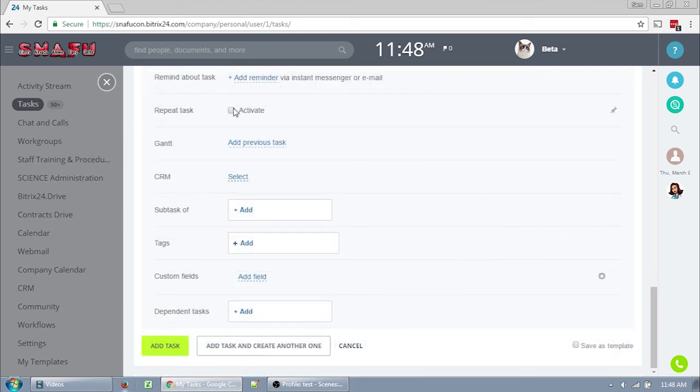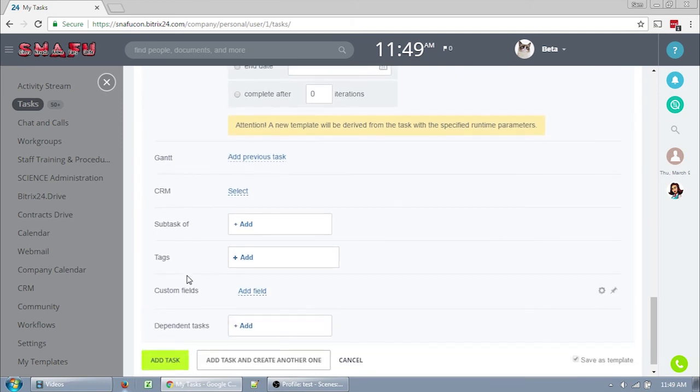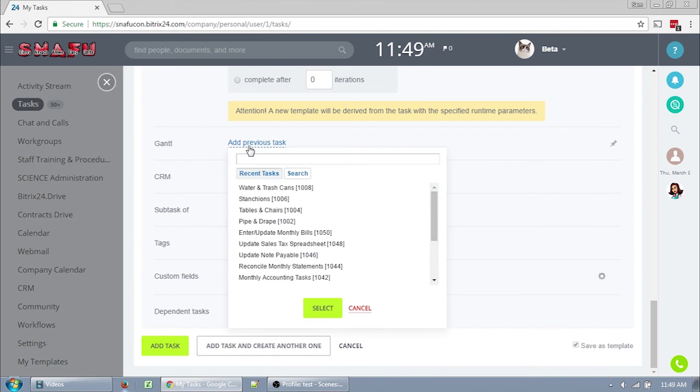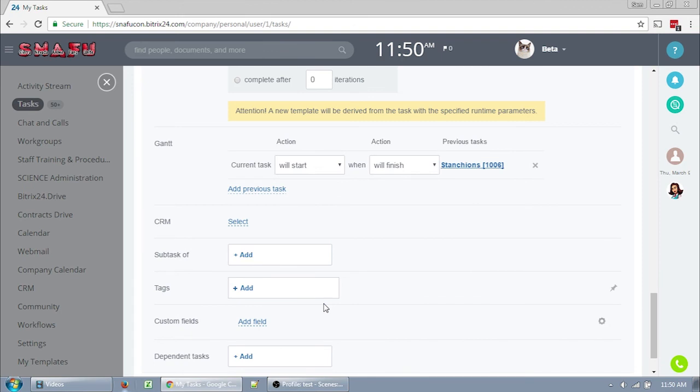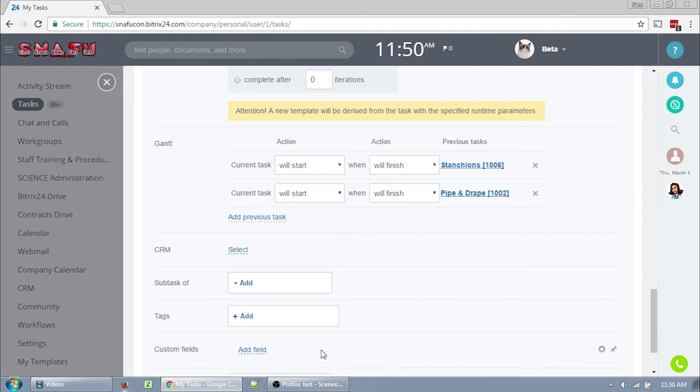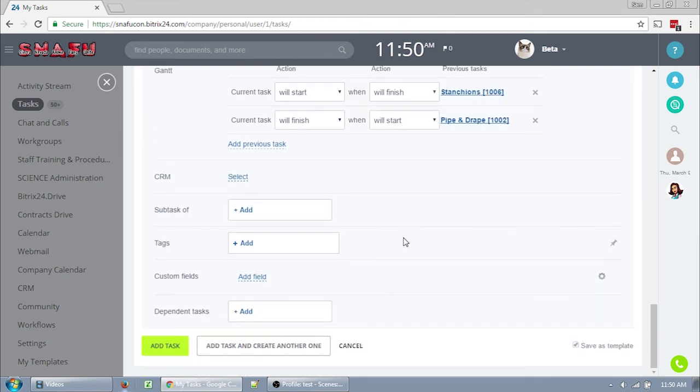Repeat task works exactly the same as how it works in the template. Fill out this form. It's going to create a template for you based on how you filled out your task. Gantt, add previous task. You can use this to make a better Gantt chart and dependencies. Click this to select what task needs to be done before this task. I asked customer support how multiple tasks work together, and I didn't get a good answer. I think the support girl didn't know either. From what I gathered though, this won't actually start tasks, but simply lays them out on the Gantt chart for you. I was told there will be more functionality with this at some point in the future. It does list previous tasks when you open the task itself, and it shows links together in the Gantt chart task view.